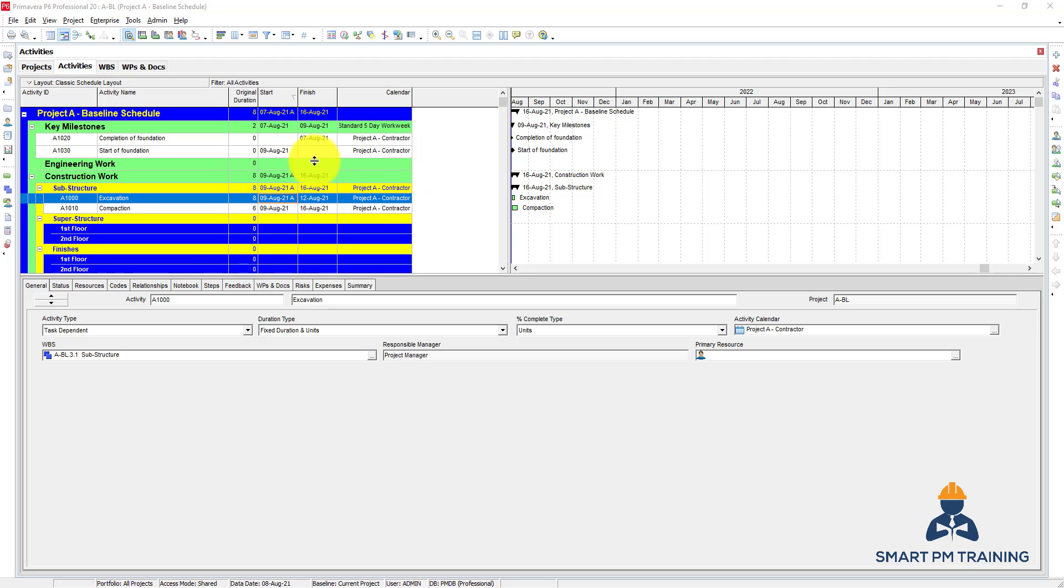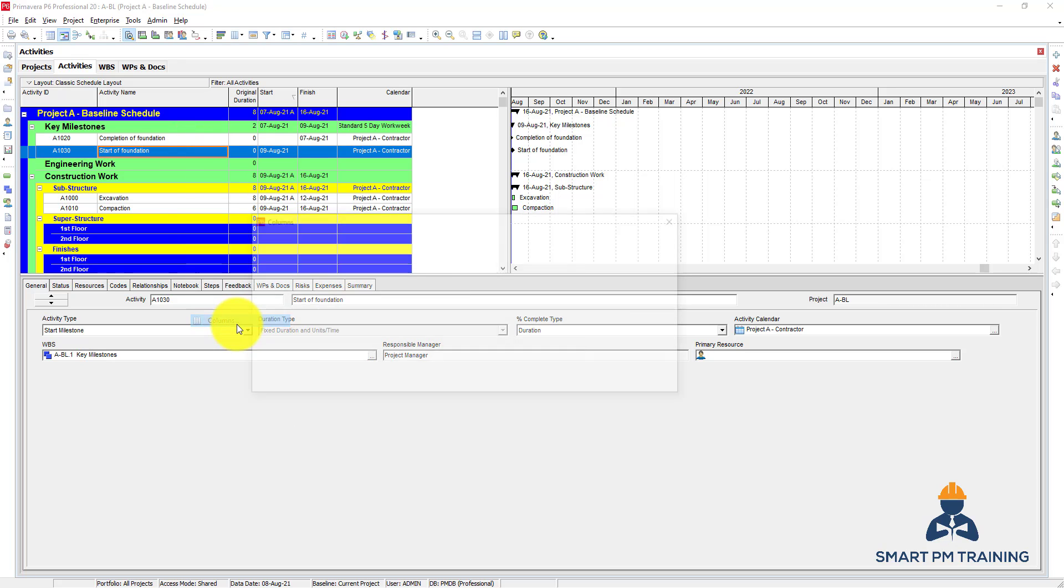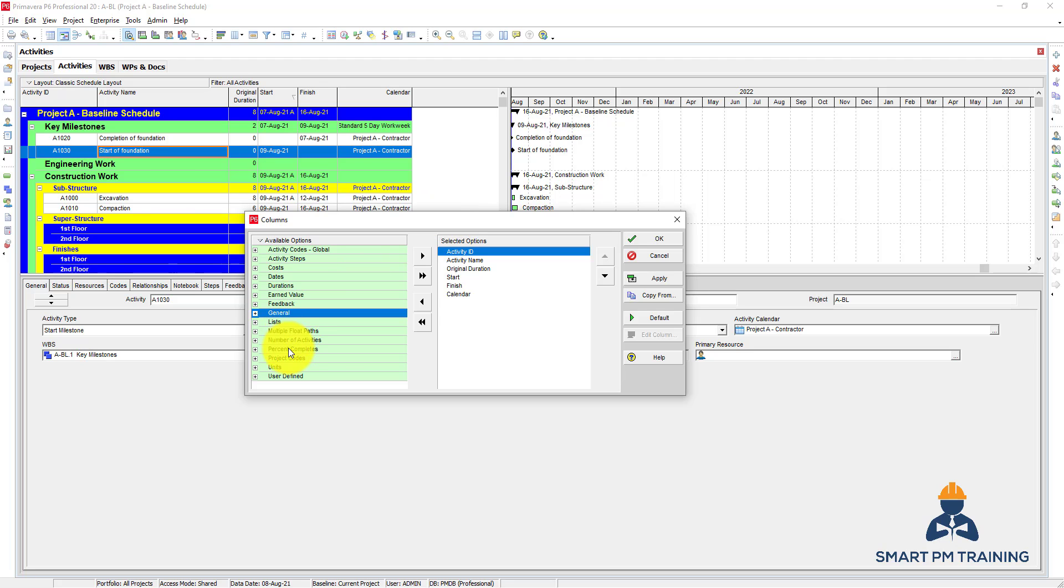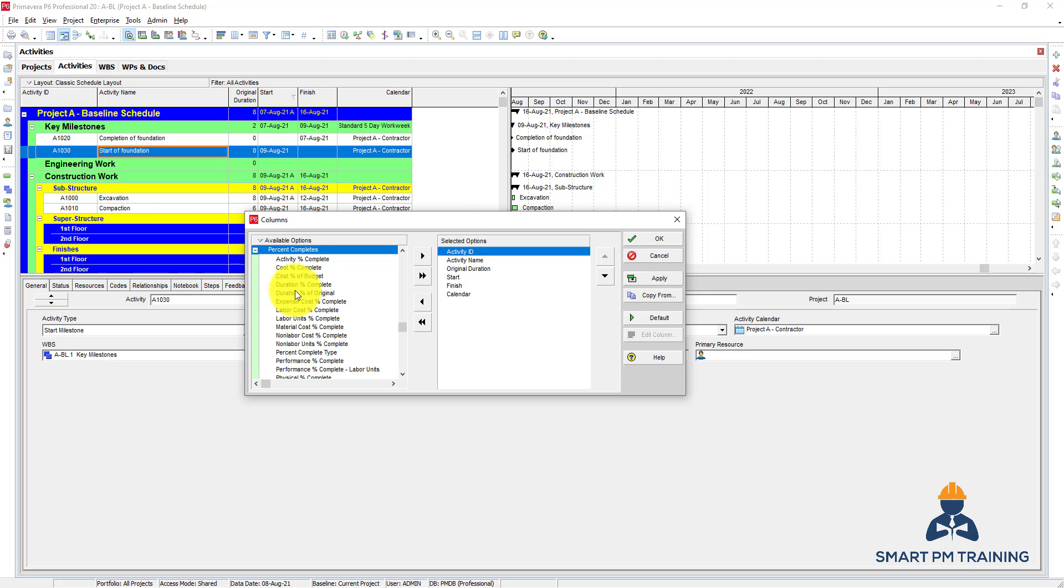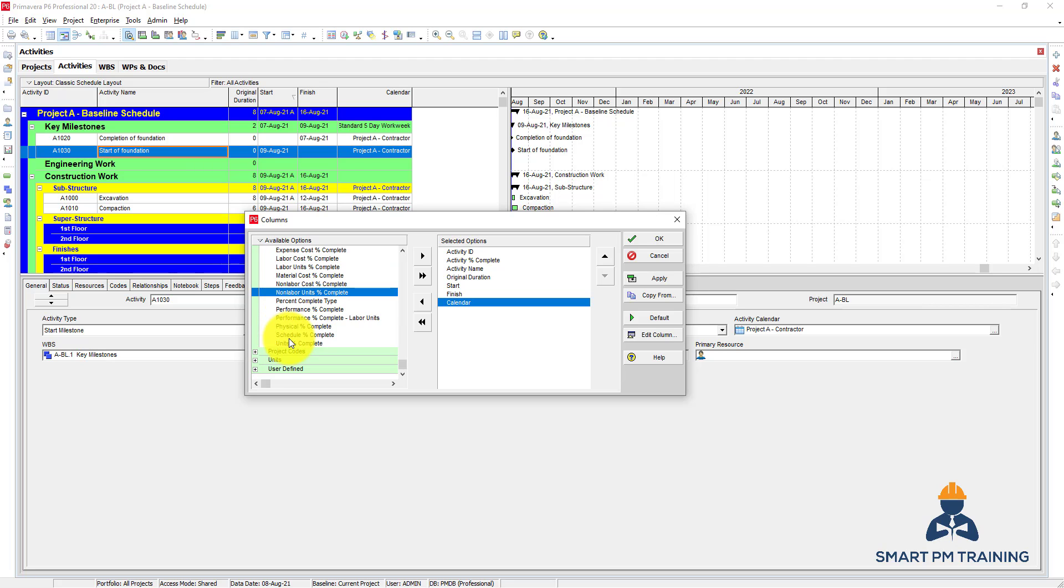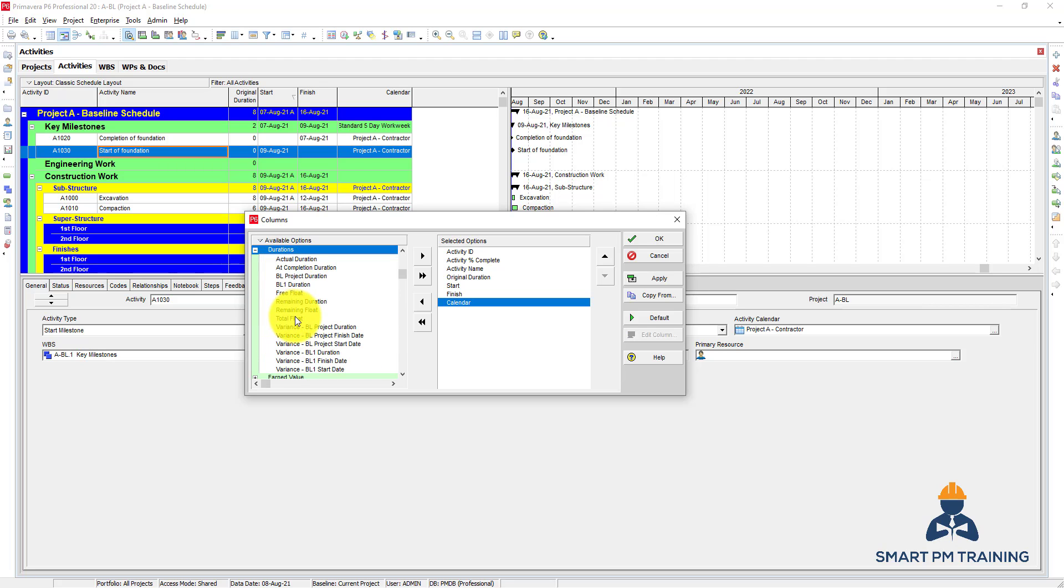You can also customize the layout of your activities. Right-click, choose columns, and you have a wide variety of options here. Which columns you want to present based on what you are trying to review, you can show the percentage complete, you can also show a lot of information here for the duration part, you can show total float.